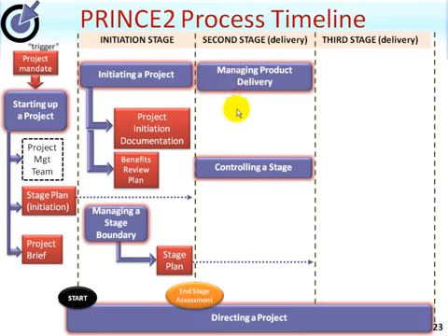But for the purpose of this high-level view, the work package needs to be approved by the team, and once that has been approved, the team will start creating the specialist products. So the work package will need to be, first of all, authorized by the project manager and then agreed and accepted by the team before work can start. But within the work package, along with other information, there will always be, for example, at least one product description for a specialist product in each work package.